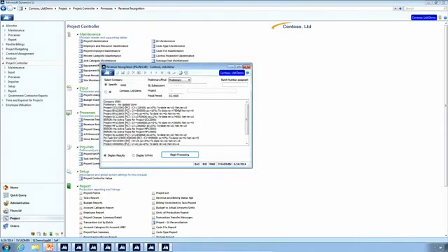If it has over-recognized revenue in the past, it will back out revenue. So it's an ongoing process. Now, how does it determine what it will recognize? You would enter your contract value for your fixed price contract, and then you would associate budgets to each type of cost.